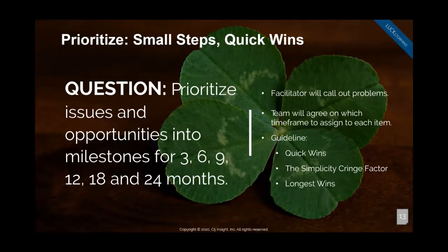One other thing we do, by the way, is usually that very first phase, the 3-month piece. First of all, it's usually the 80-20 rule. So 80% of what everyone wants to get done is in the first 20% of the project plan. And everybody who does it looks up there and says, I know we can't get all that done in the first 20% of the project plan. So the next thing you do is take that first 3 months and say, let's now reprioritize that. Let's give everybody some voting dots. And let's say, okay, of these things in the first 3 months, what are our priorities within those? So you have as detailed a list as you can to break those things down and begin to move forward.